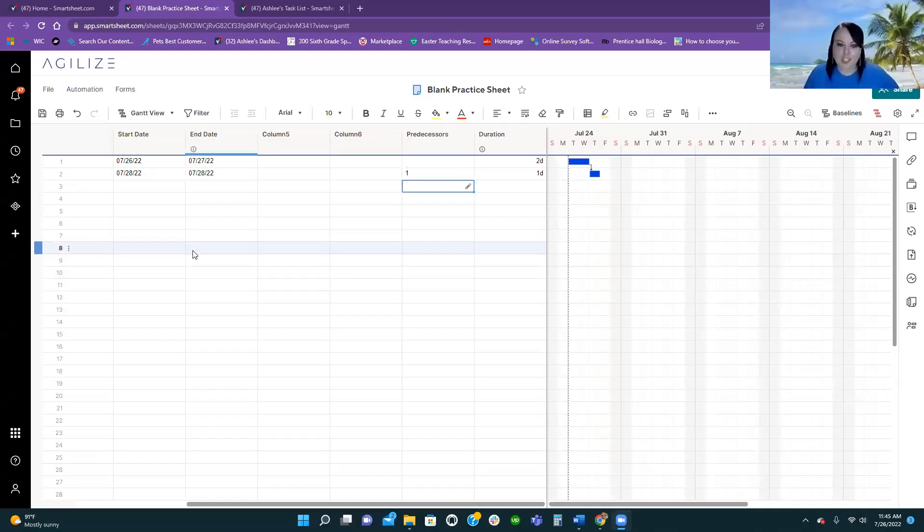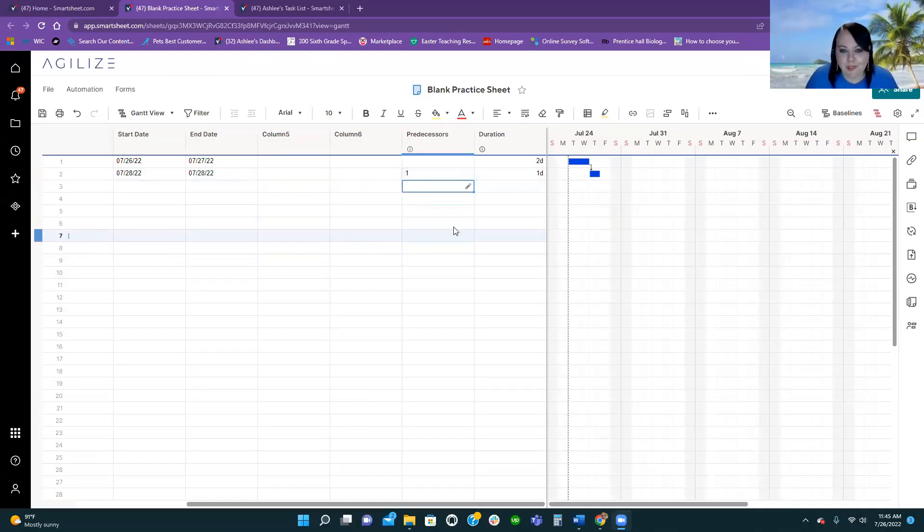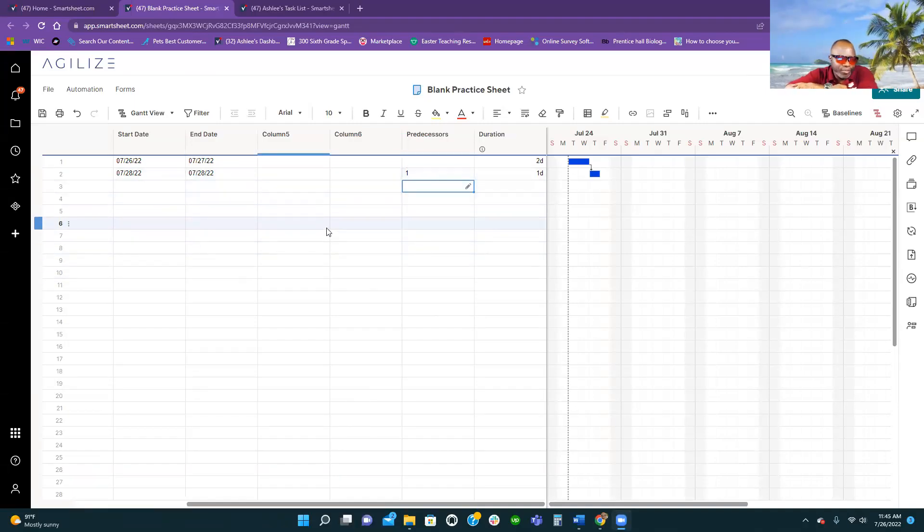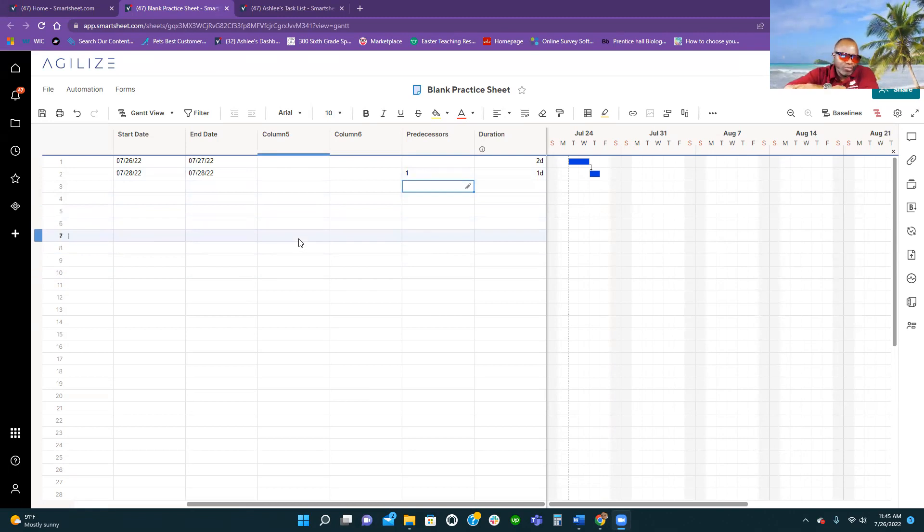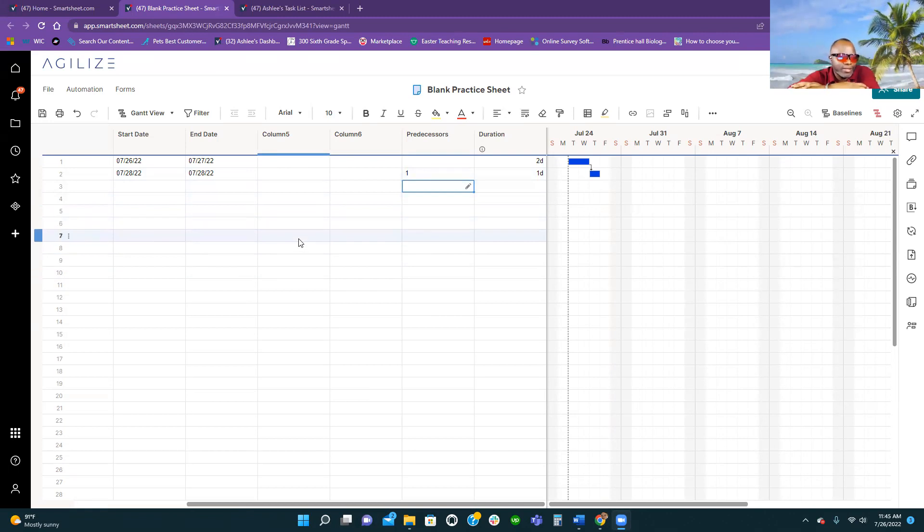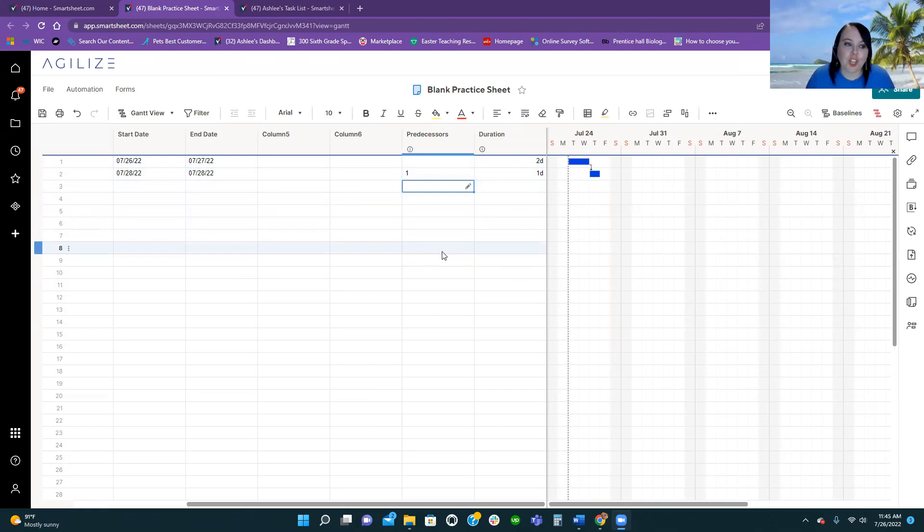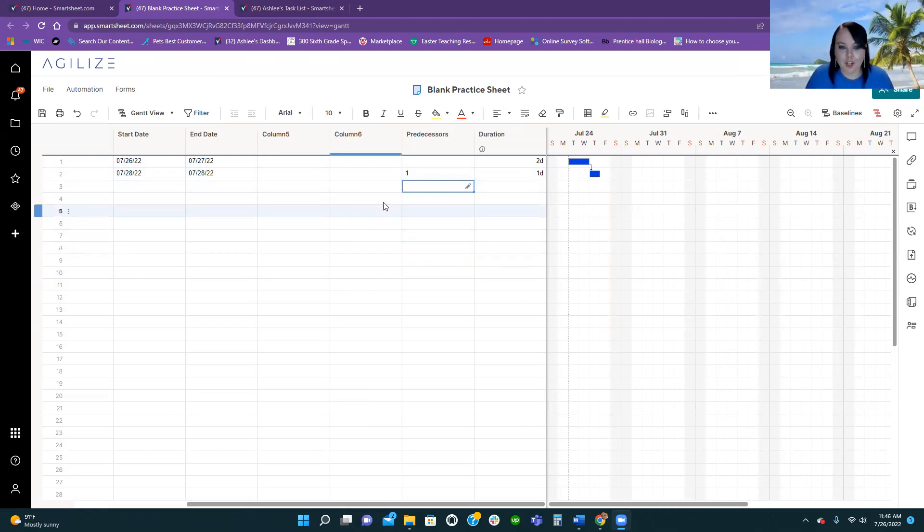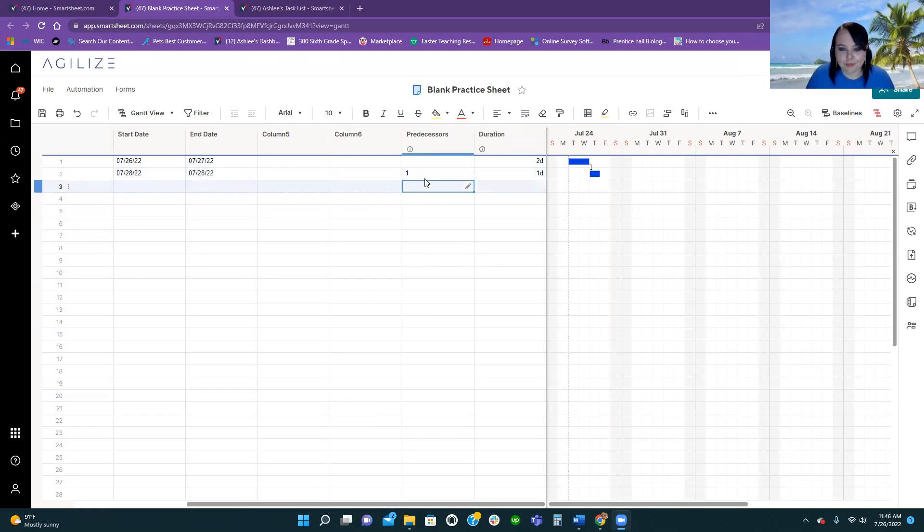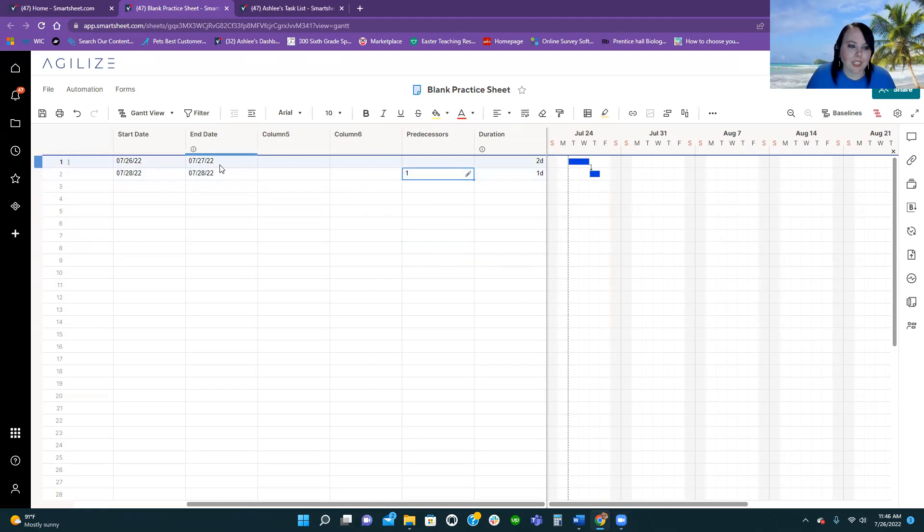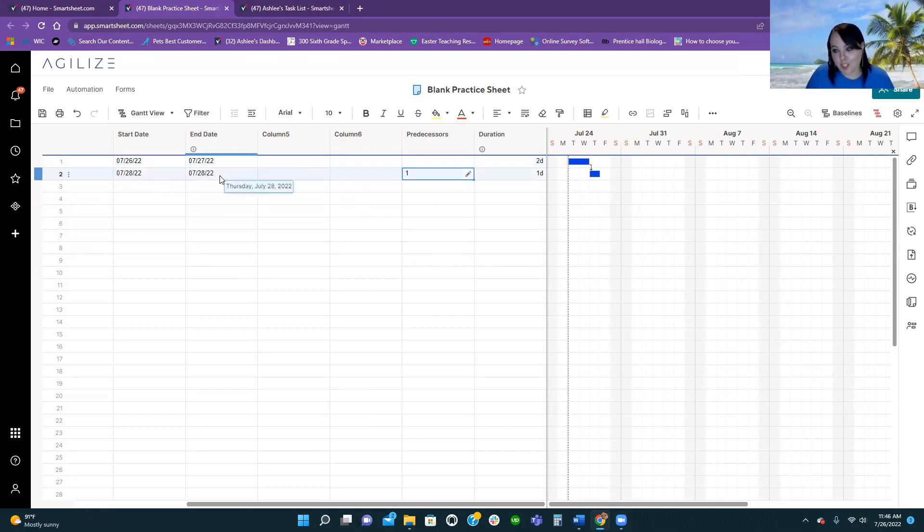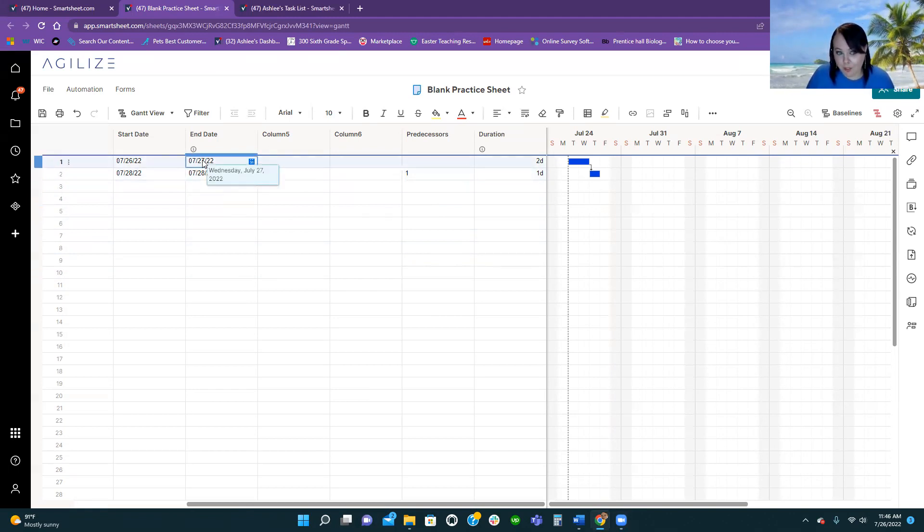I know for project managers, they're amazed at how versatile and flexible it is. Can you show us that sheet you were showing us in the first video? There we go. All right. So, you were showing us how we can use this predecessors column and link tasks and all this awesome stuff. What else can Smartsheet do for us as project managers? Just in project management, I learned that you can go into your tasks and say, this task is ending, but I don't want this task to start for three days after this one's finished.